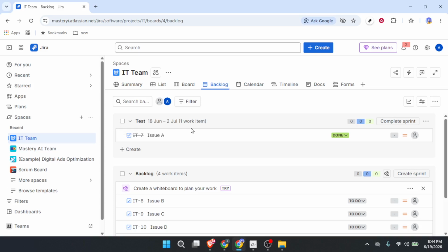And here is a tip I have learned from doing this dozens of times. Make sure all of your tickets are in the Done column or properly moved out. Jira will not let you complete a sprint with unresolved issues unless you force it, so double-check that first.